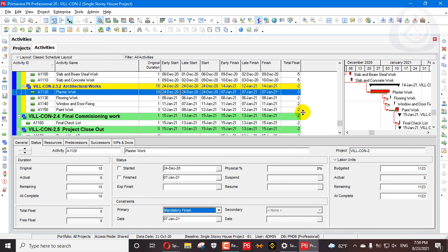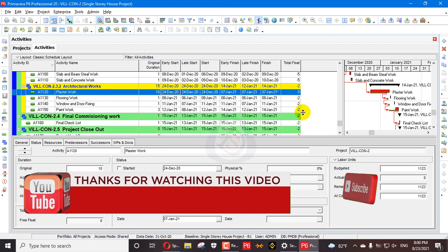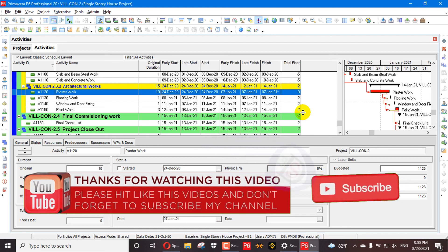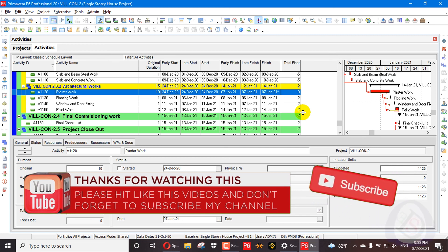Constraint is a different scenario — with constraints your duration cannot increase or decrease, but with expected finish your duration will increase and decrease and it will impact your deadlines. This is today's content about what expected finish is and how to apply it in Primavera P6, how to assign deadlines to your project, how to freeze project finish dates, and how to fix your deadline in Primavera P6. Thanks for watching — please like, comment, share, and subscribe to the channel. See you in the next video.